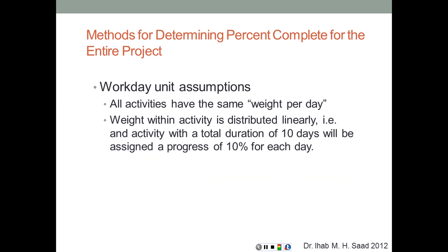The workday unit assumptions: all activities have the same weight per day. The weight within an activity is distributed linearly. So as we just mentioned, an activity with a total duration of 10 days will be assigned a progress of 10% for each day.